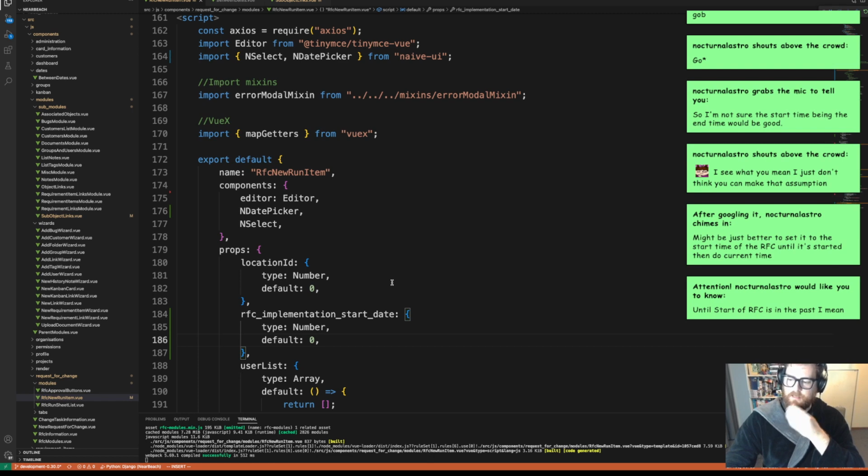Usually with the RFCs, you tend to actually have a specific time when people are starting at a certain task. And the idea is to make sure people don't start their task before they're meant to, which could interrupt other people. So that's the idea of this, why it's got start times. And usually when I had to do them, it was very, very strict. I usually had contingency time put in it, just in case.